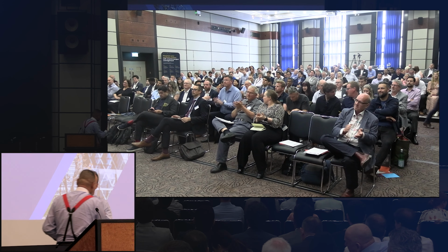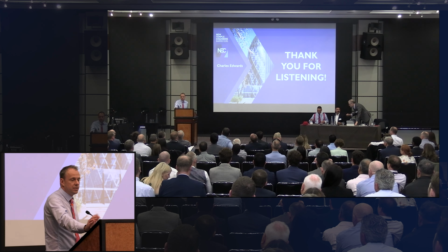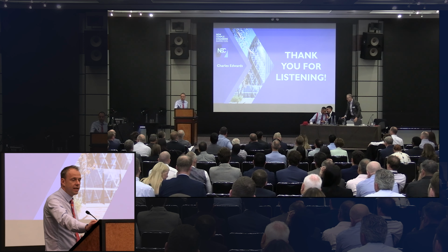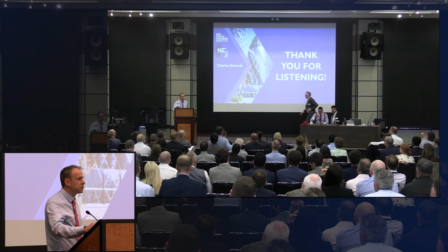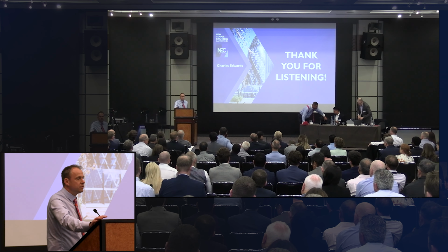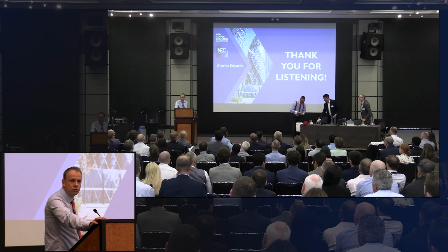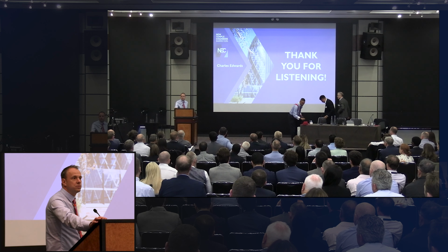Okay, thank you, Charles. It's really good, isn't it, to spend half an hour analysing a single clause. That's not because NEC is complicated, it's an important clause. There's a lot of content to it. I just want to pick up on something Charles said right at the beginning, just to emphasise his point. If you're under an option C or an option E contract, I would generally say that's probably your biggest risk as a contractor, disallowed costs.